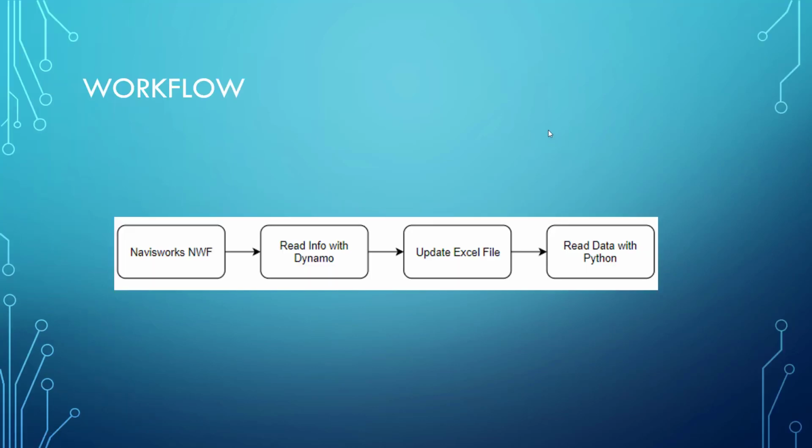we'll have a Navisworks NWF. Now that NWF is going to be made up of NWCs that we're dumping out of Revit and AutoCAD and some other files. That all depends on what you're working with, but generally, that's made up of NWC files that you'll be clashing with.